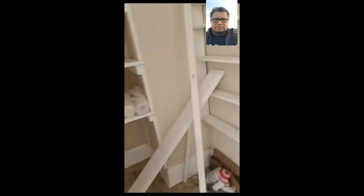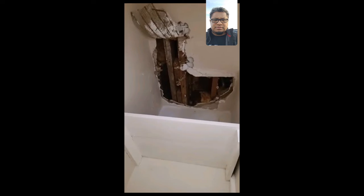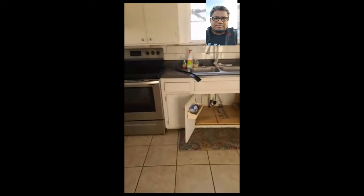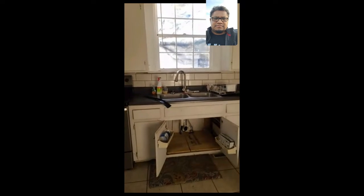Jeffrey found a possible water or drain leak in the ceiling of the pantry, most likely from one of the bathrooms upstairs. We're going to have to investigate it further and figure out how to repair it. There's also some kind of bump out in the pantry. It may be a sewage line from upstairs or some kind of structural post that may be holding up a portion of the second floor. So we will have to be careful with this area when we remove the pantry walls.